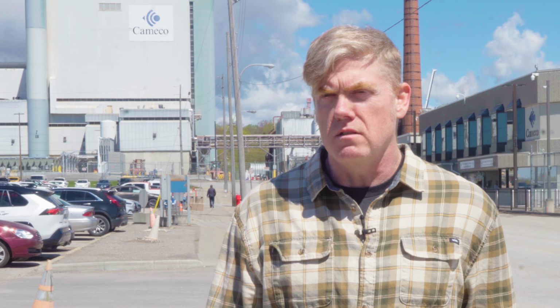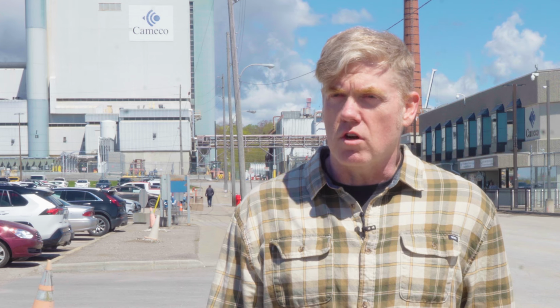It was really important to have a successful project with Building 27 being decommissioned. Deconstructed is one of the words we use quite frequently. We know PDI as Priestly Demolition, but they essentially deconstructed this building very methodically. There was a bulk accumulation of certain hazards because of the age of the building. When it was built initially, asbestos was very prominent within the building, plus all our radiological hazards. It was a UF6 plant, but it does utilize other uranium products to develop the UF6. So there was a hodgepodge of contamination within the building.